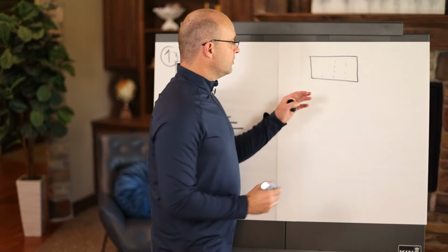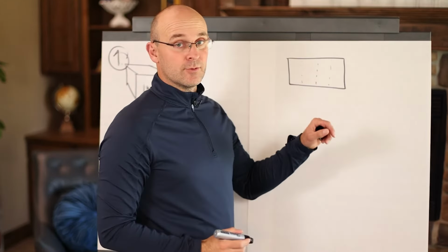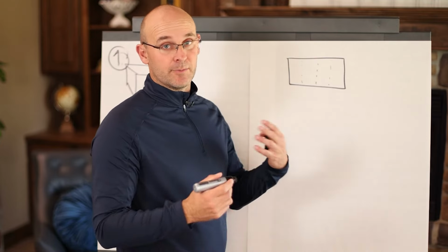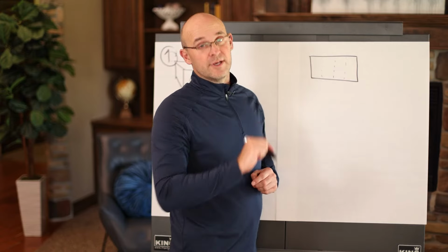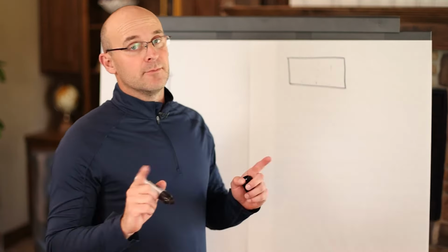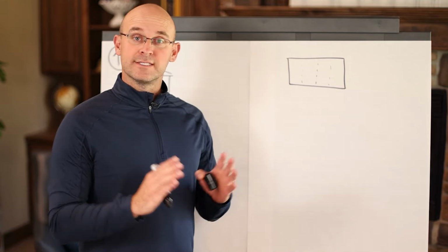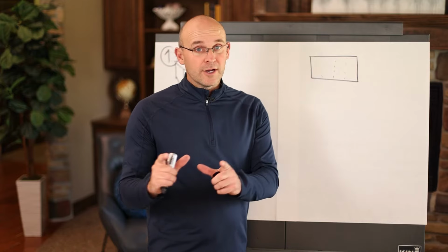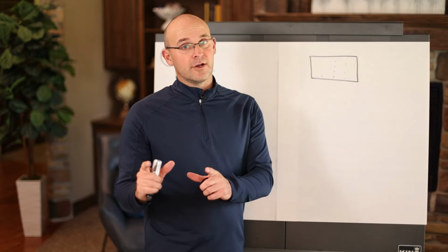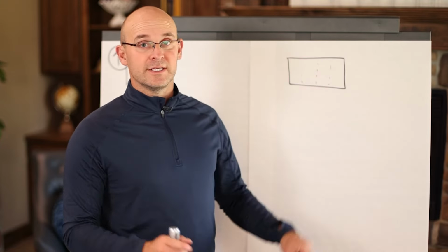What you will do is analyze each of these. You can do it by room, or by grid square or column square. You will analyze the density, and for more information on that, you'll have to come to the free training. But you will analyze it for density on a scale of 1 to 10, is my preferred method. Room by room, or grid square by grid square, or column square by column square. You'll scale those 1 to 10, and you will not create zones based on square foot.